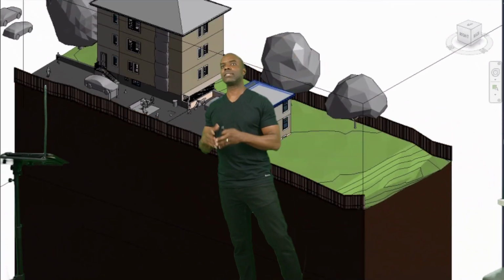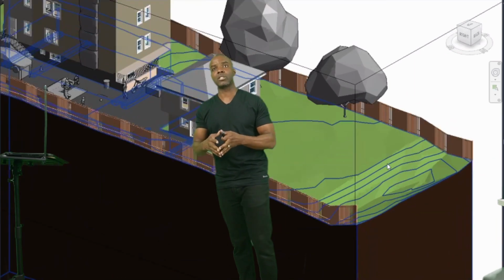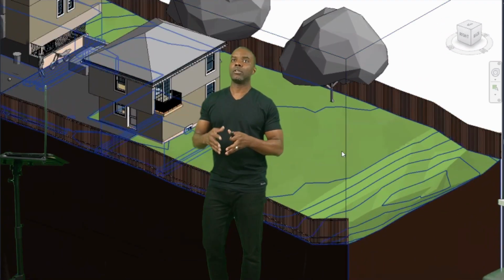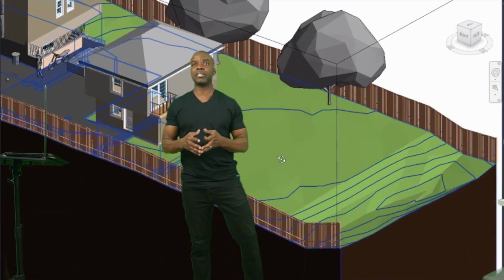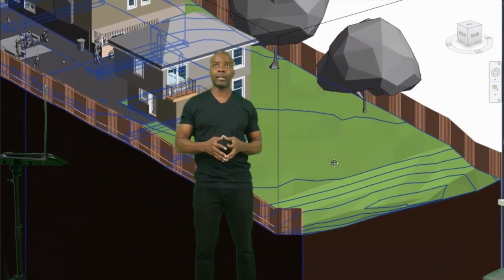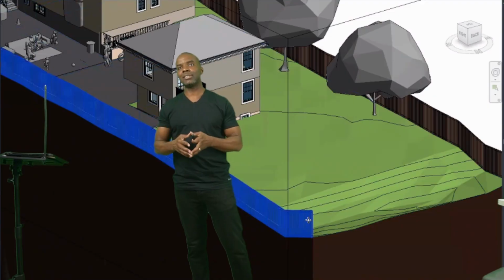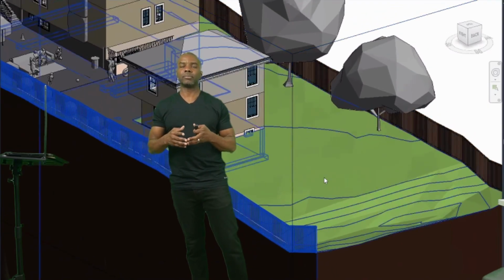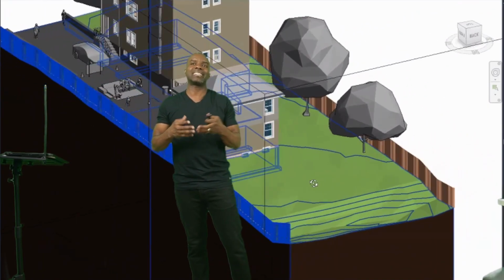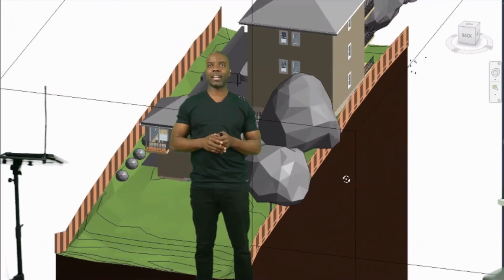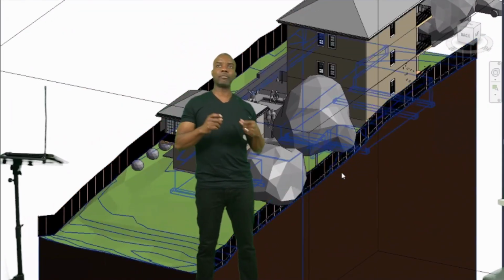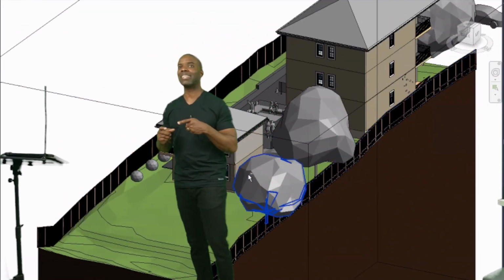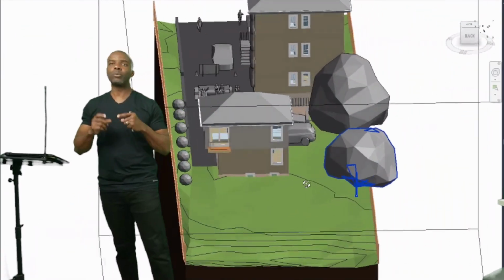All of these things had to be addressed. TRCA was looking at the watershed. The Ravine and Natural Feature group was looking at actually preserving that feature. They don't want you to backfill that in any way. And then the trees that were on the site, we had to develop the garden suite so that it's outside of the tree protection zone. So while it's not shown here, there's a lot of layered information and approvals that we had to build into this design so that it was as of right.